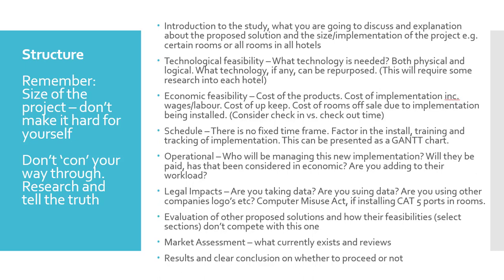Next is economic feasibility — the cost of the product, the cost of implementation including wages and labour, the cost of upkeep, and the cost of rooms off sale during installation. Consider check-in versus check-out time: if it's a quick installation you may not need to take rooms off sale, but if you need to bracket a TV, install it, update it, and need the room off sale for a day, you need to factor in every room's average price. Go to Booking.com, Trivago, or TripAdvisor, look up one midweek date, one weekend, and one random date, get an average price, multiply by the number of rooms, and that gives you the cost of rooms off sale.